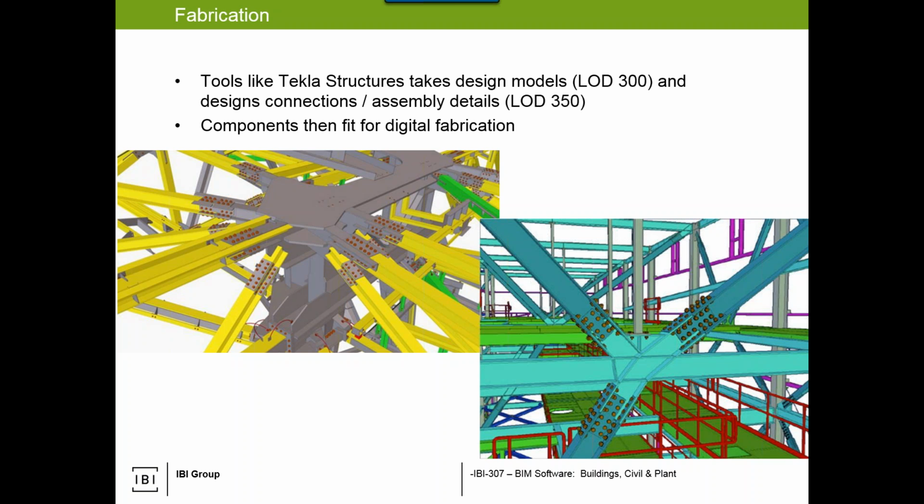But most likely this is where the organization using Tekla will develop these details, create the shop drawings, apply the professional seal that we call for in our specs for shop drawings of this nature, deliver them back to us for shop drawing review, and then deliver them to the contractor, which we would then review, and then the components get delivered to site after fabrication. So that's kind of where Tekla fits in.